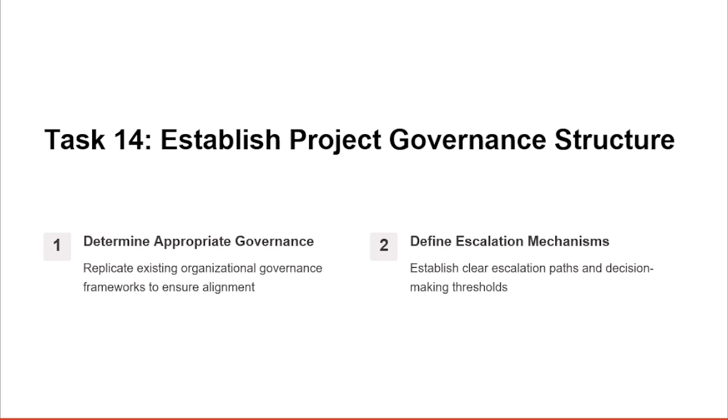And now let's see how to escalate. For example, the process for escalating issues through defined channels: emails, phone calls, whatever method of communicating that escalation. Also, who to escalate to. For example, the project sponsor, stakeholders, senior management, the governance boards, the security team. So all of these come under defining the escalation paths and thresholds.